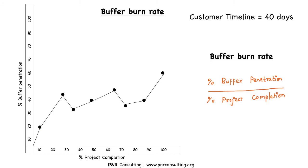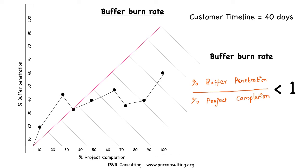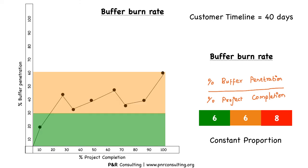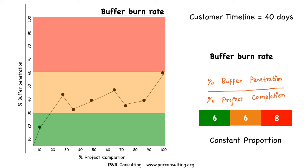You can plot several such points based on buffer penetration and project completion. A project manager needs to ensure the buffer burn rate is lesser than 1. If it equals 1, buffer penetration is equivalent to project completion — nothing much to worry about, but there is a possibility of slippage. If it is less than 1, the project is going fine. If it is greater than 1, the project is consuming the buffer at a much faster pace. With our linear buffer model with constant proportion, we can define red, yellow, and green zones in the graph. Notice that even for 0% project completion, up to 30% buffer consumption is allowed, which is not logical. So we need to define the buffer zones differently.